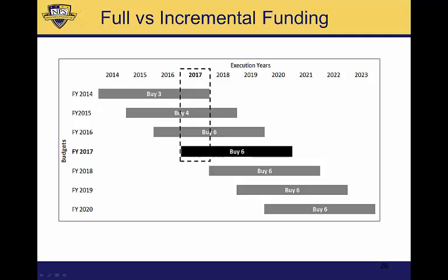The bars represent the orders placed on contract in 1 year that are not all built and delivered until the 4th year, the lead time for production, say. Given that, assume it's time to craft the FY17 budget, the darker bar.